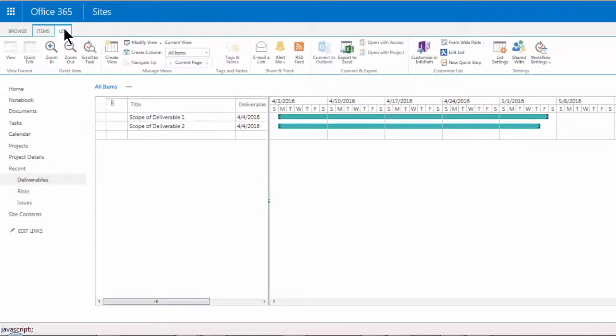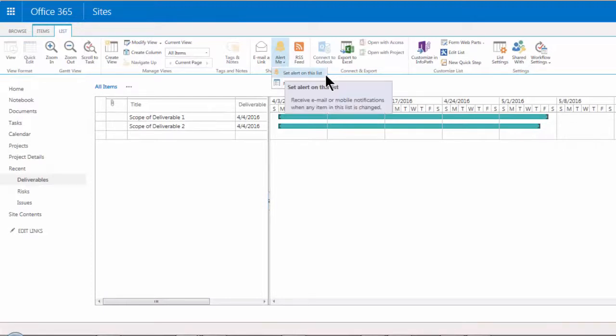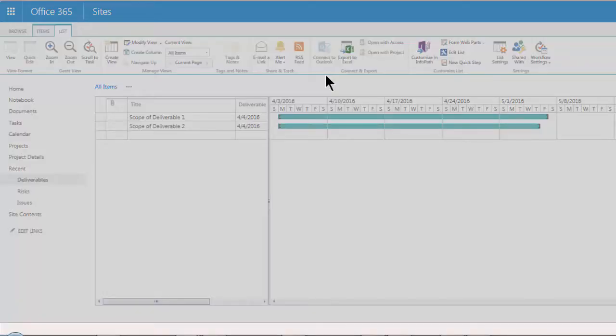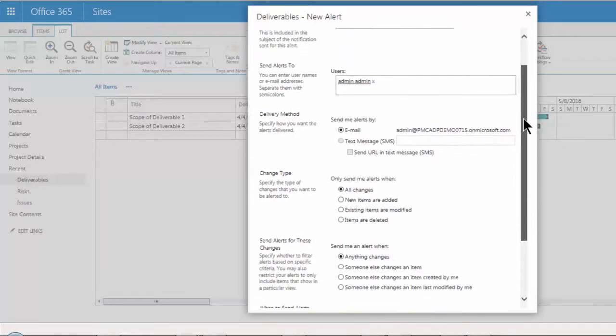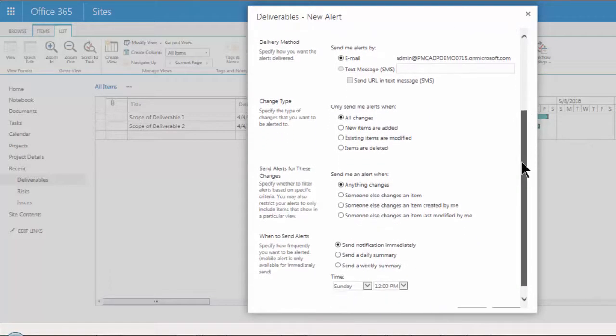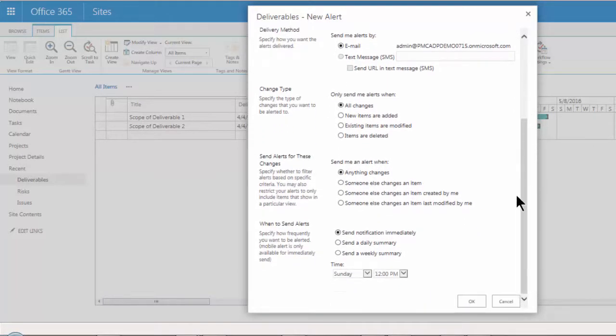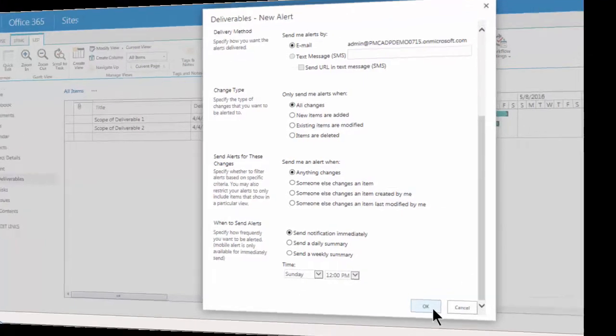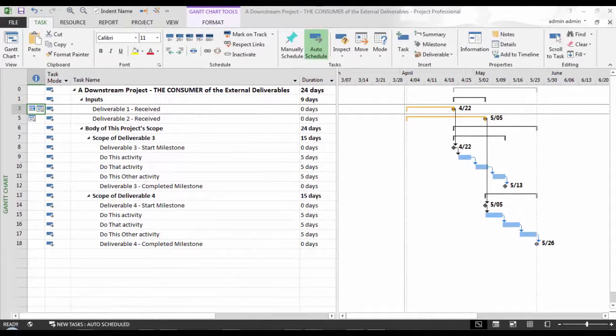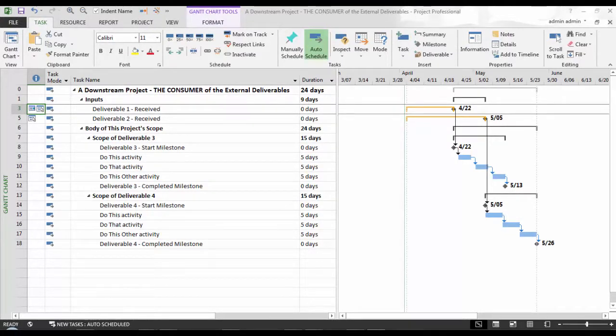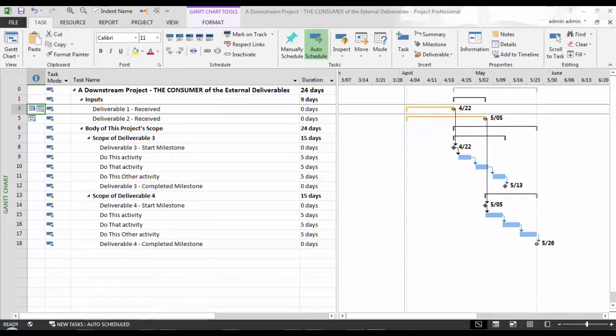Now here's the thing. When a downstream project was looking to consume deliverables, it is recommended that they set up an alert to this list of deliverables they need as input in order for them to in turn meet their respective commitments. As such, the user is presented with a SharePoint related alert me window, which allows one to set certain comprehensive preferences. Assume that I had set up my alert before the change in my upstream producer project. Such a notification would advise me to go to my downstream consumer project and make the necessary updates.